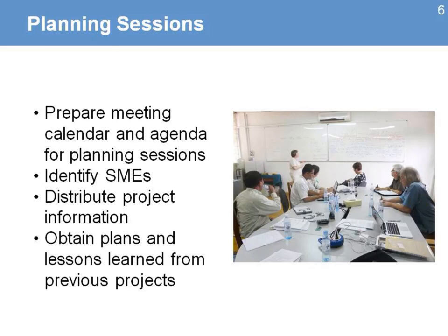The next step is to start preparing the planning sessions. That means that as a project manager, you need to look at the schedule and prepare a meeting calendar because you're going to have many sessions. It's not going to be just one day where you prepare all the plans. You may need even a couple of weeks to complete all the plans. So prepare your meeting calendar and agenda on the planning sessions.